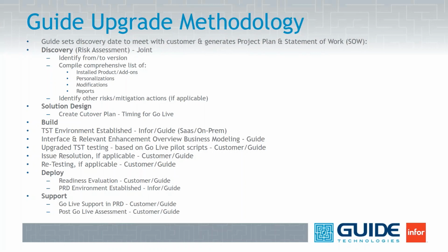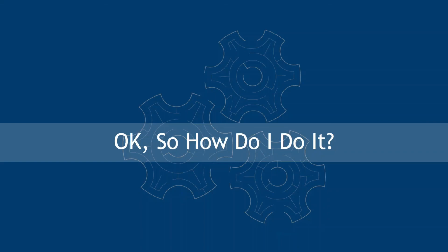Almost like we were doing a fresh implementation, but on a much lesser scale. Then we'll go through a build phase and create a test environment. We'll do that migration and make sure it's functioning. We'll look at mods. We'll look at data. We'll make sure everything we need to know is there, so there are no surprises. And then we'll do issue resolution if we need to, retest as we need to, deploy, and support you going live.